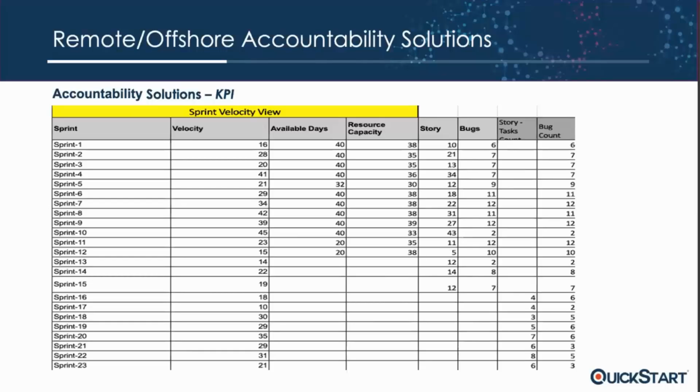So again, accountability is very important. You can use something similar to what we are sharing here as a tool to identify the KPIs of your team members. And when you are predicting your next sprint, this would help you. My average is like 20 story points every sprint. That's my velocity. Then, when earlier I was talking about the grooming session, if my capacity is becoming 50, then I know that I'm over by 30 story points, and I need to discuss with the stakeholder and the product owner what needs to give in order to accommodate 20 story points for that sprint. Okay.